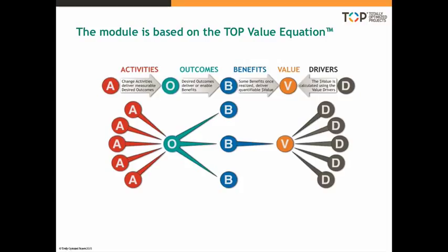This is a very simple model that shows how the project activities deliver the business outcomes, their benefits, value and drivers. And what is important is it enables you to link all of these aspects so you know what activities will deliver which outcomes will deliver which benefits, what the value of those benefits are, and what determines the value of those benefits in terms of the bases and assumptions, what we call value drivers.